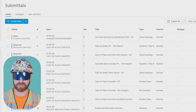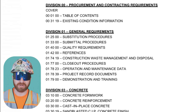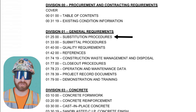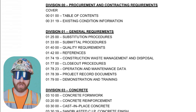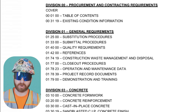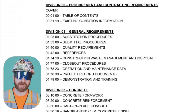One last item: if a material is discontinued or the contractor has a better alternate to suggest, it's called a substitution. There's generally a form you have to fill out, but a note of caution — not all materials are compatible, so you'll have to do your homework to ensure material compatibility won't create an issue after installation.